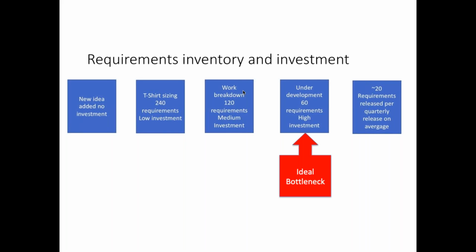Well, that's something it sounds like everybody could do today. Just before you estimate features, make sure to estimate a percentage where you can do process improvement as part of that process. And you need a well prioritized backlog of process improvement ideas. Absolutely, and mix all that together.